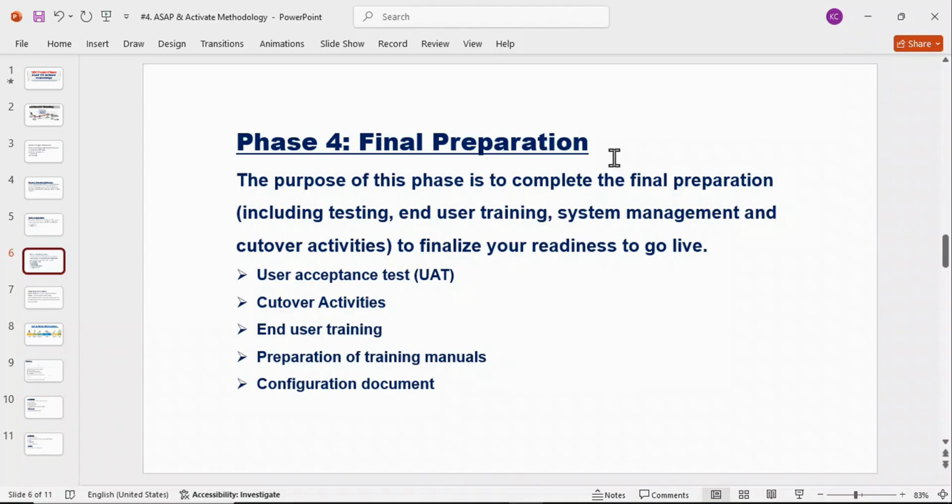Whenever the contract sign-off happens, let's suppose this implementation is done by IBM. Okay, it is being done by IBM in Tata Motors. So there will be a contract, signed by both parties, Tata Motors and IBM. In the contract itself, initially they will specify all these conditions, guys. It will say that whatever configurations you have done, you have to prepare a document and hand it over to Tata Motors. And those are the property of Tata Motors only.